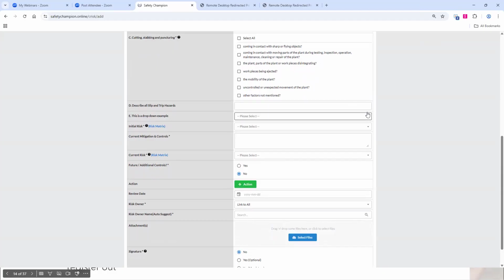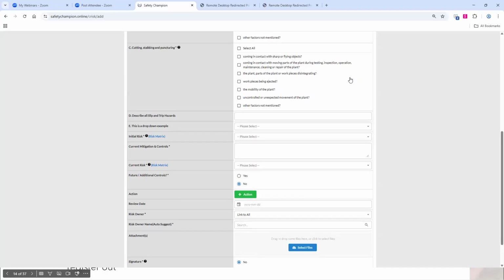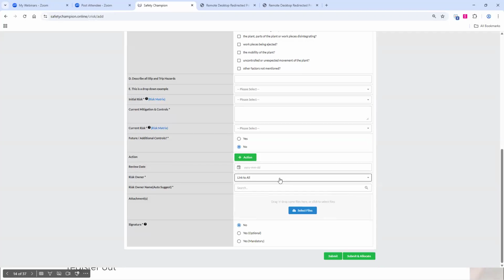So this particular module allows that flexibility to pull that information right up and be seen in a very clear manner, as opposed to managing a spreadsheet across several different departments on those intervals that you have to work through them. Like Kat said, it's going to link the risk owners as needed. It's going to pull from your HR area if that's who the risk owner is. It can also loop in other people from a manual entry perspective. But the good thing about it is that we'll give you the current risk, which we call the initial risk, then the current risk after you've done the assessment with your executive, and then you can look at what that residual risk looks like afterwards.